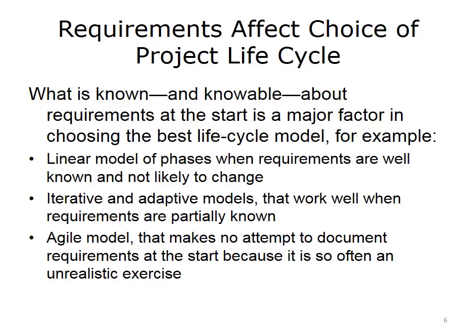Requirements are a major driver in determining the best lifecycle process model to use for your health IT project. There are 4 broad classes of lifecycle models: linear models, iterative models, adaptive models, and the so-called agile models. They vary tremendously, especially in the requirements and what is known about requirements in your project. In linear, also called sequential lifecycle models, you can proceed stage by stage or phase by phase. That may be fine when requirements are known and understood and are highly stable at the beginning of the project. Some other projects may need one of the more flexible models, such as the iterative or adaptive models.